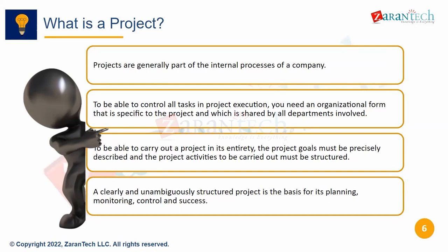So Khalid, in that case, we can assume that the Project System caters to the complete internal order accounting and more than that? Yes, it will. See, when we go into further slides and talk about the WBS structure, I'll explain further. There can be multiple WBS elements in one project, but each WBS element is also a cost object, so one WBS element is equivalent to one internal order.